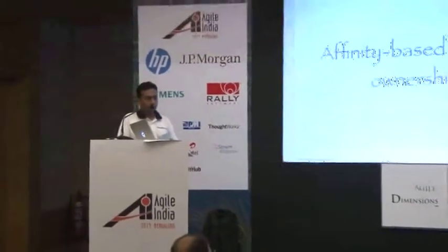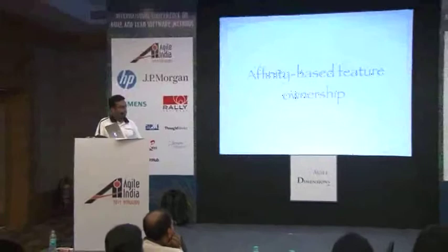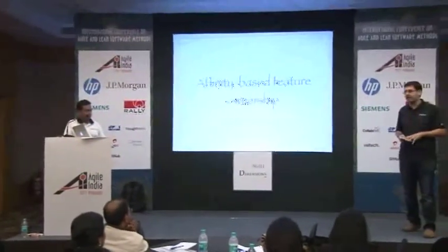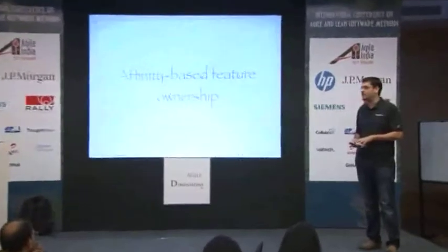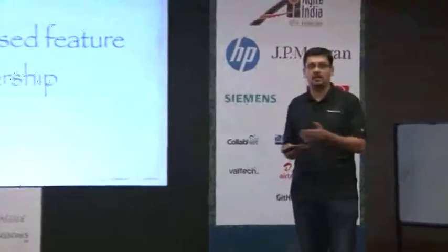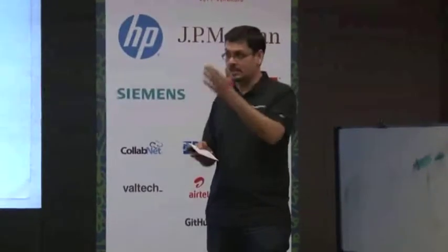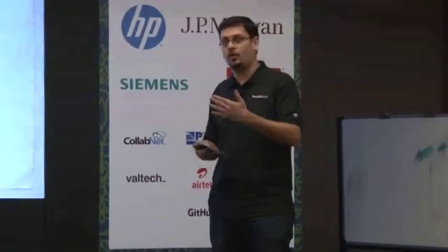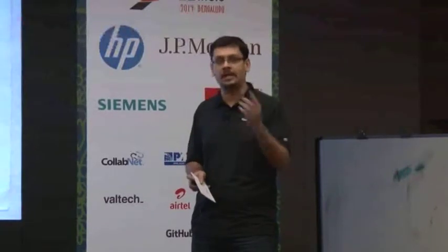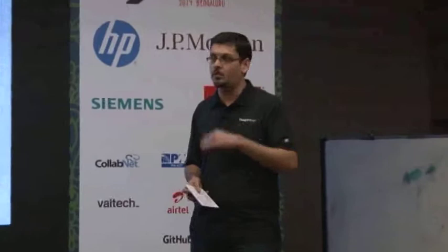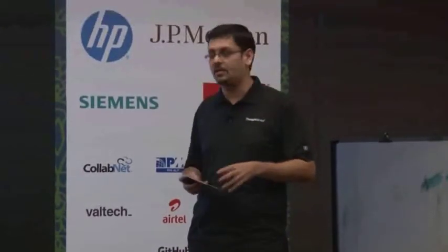There is an obvious risk, right? If you split up by features that are closely related, there is a risk of getting into a state where there are silos, where there is not enough knowledge about one set of features in your code base in another location. So we're always conscious of this risk, but we find that the trade-off between the chaos and confusion of day-to-day dependencies versus some risk of knowledge getting into silos, we tend to go towards splitting that up and finding ways to consciously have knowledge shared among those features, either by swapping people across teams or finding other ways to do that.